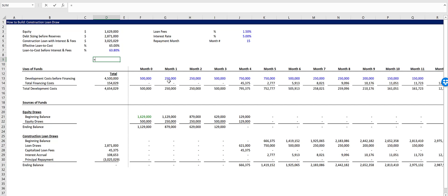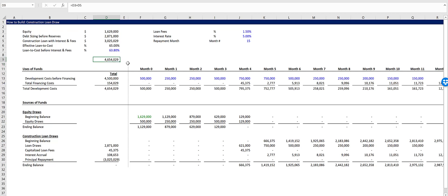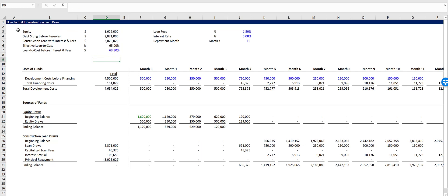And it does that by sizing the equity that's originally drawn down over here. So we can check this. We'll take the equity plus the construction loan with interest and fees. And that's 4,654,029. And so is our total development costs. So that is how you build a construction loan draw with circular references.